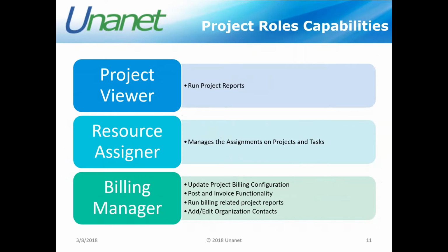So some more of our project capabilities that we want to look at are the role of project viewer. Now, just like we were talking about the viewer role in people functionality, the project viewer here under the project functionality has the ability to run project reports. So again, that project section under the reports dashboard, they could go and run a project time details, a project expense details, a project actual summary, a project performance report. They have the capability to run those looking at it from the project perspective.